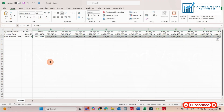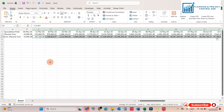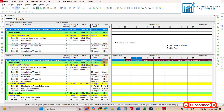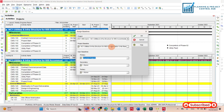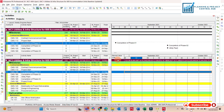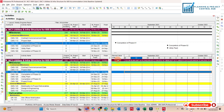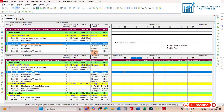Now for the earned value, we have to take the data from the updated schedule, not from the baseline. I already opened the file here — we have already assigned the baseline to this one. So it is understood: if we are taking the plan value it takes the value from the original baseline, and if we are taking the earned value it will automatically take the value from the updated schedule. Now we will take the earned value.